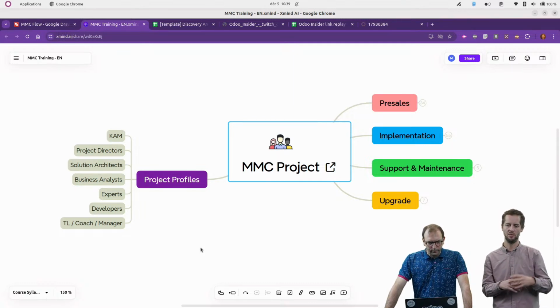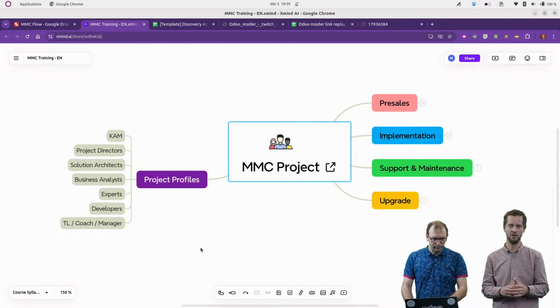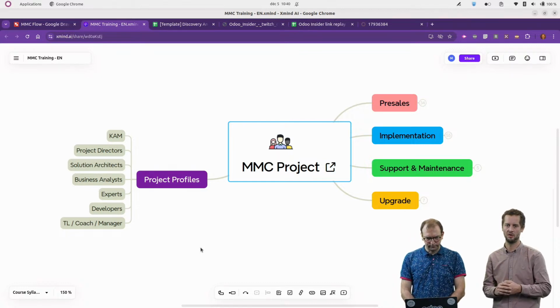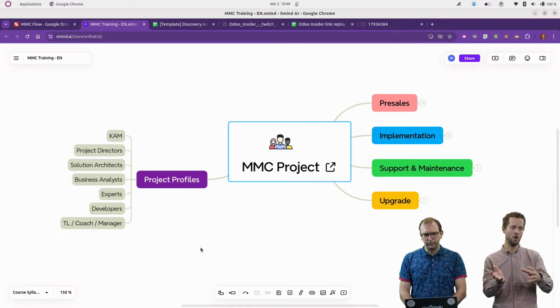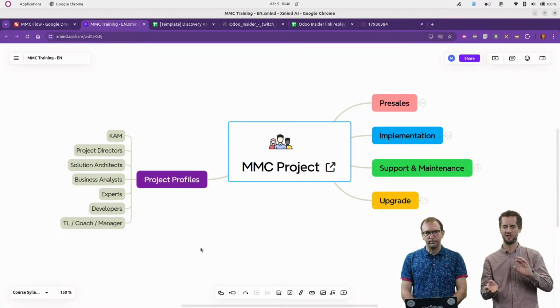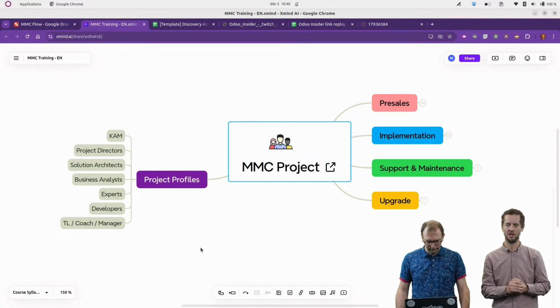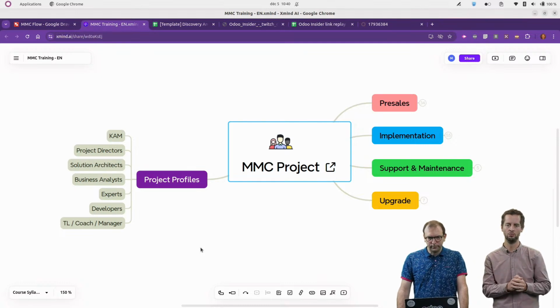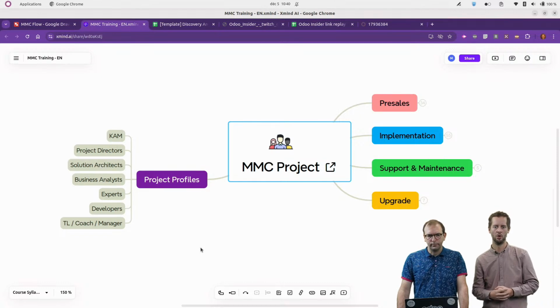But from time to time, depending on the project, depending on the moment or what we have to cover in a project, we're gonna involve one solution architect, because he might already cover that topic in another project, like for example some specific access rights, some specific integration, or some specific elements in the project, or we have to tackle a specific scope, like we focused those 2 months on the project on finance, and we are not quite comfortable because the topic is quite complex. Then we're gonna pick one expert in that domain to help us to work on the project.